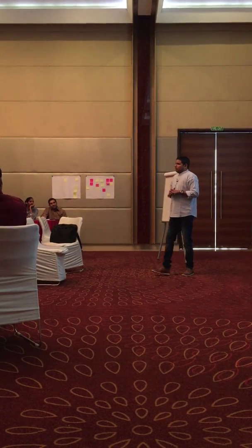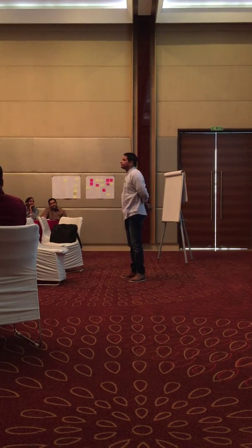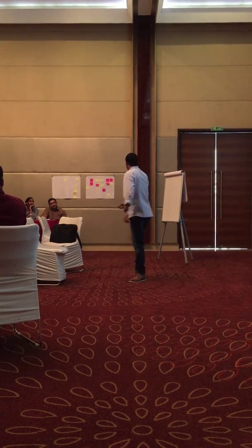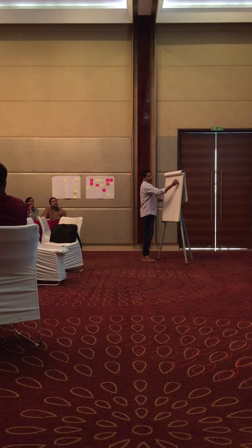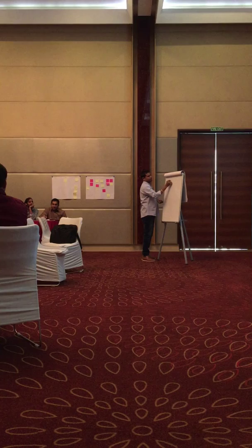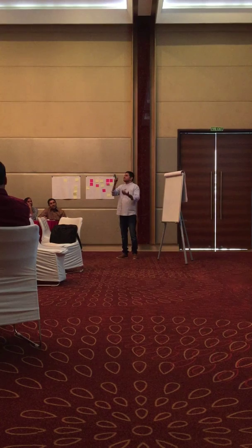Now, tell me what can be part of the definition of done? There's a, again, small thing. Confirmation criteria is equal to acceptance criteria plus done criteria. AC plus DC is equal to CC. You've done geometry, right? More geometry come. Right? What is AC? Acceptance criteria. Who is giving that? Product owner. At the time of discussing the story.